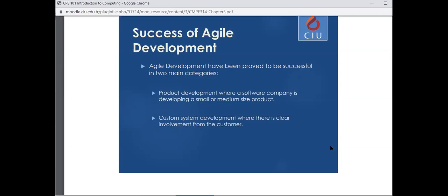It's not going to be 1,000 people, like interactive games, basically. In an interactive game, 1,000 people can easily work on it because there are so many roles in there. So this is not a very good idea to be implemented on big scale projects, but rather on medium sized manageable projects. And the customer should be willing to provide their involvement. If they are not going to provide you any feedback, it could be very difficult to manage agile development.